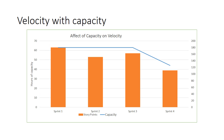How do we help management and the team understand what's going on? Since we're agile, we want to make the effects visible so that we can make appropriate improvements as needed. We can create a chart that shows a line for capacity and overlay that on a bar chart with story points per sprint, so we can easily see the effect of changes in capacity on our story points.